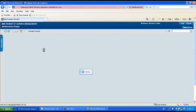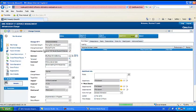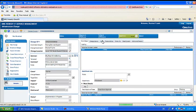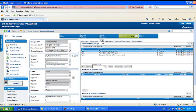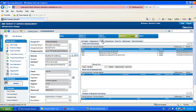Once a change request has been approved, action groups are notified of tasks allocated to them. Note that tasks can be concurrent, meaning multiple tasks can be actioned at the same time, or sequential - tasks cannot be started until the previous one is completed.